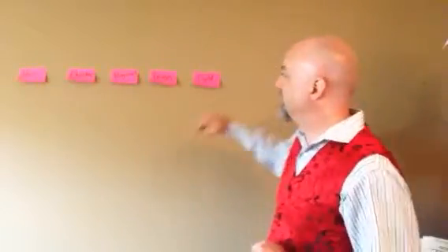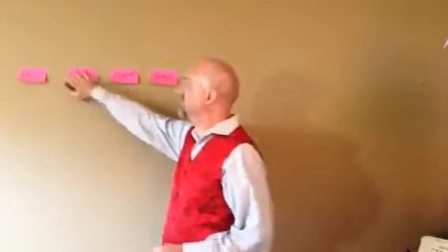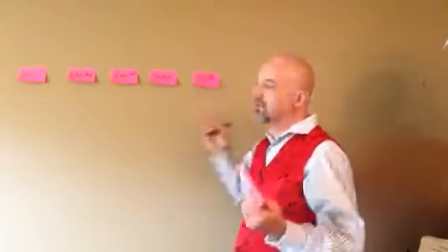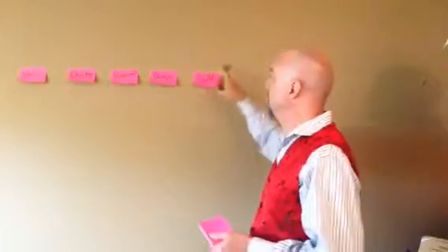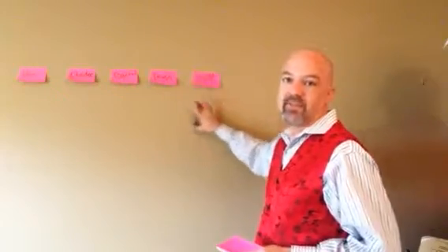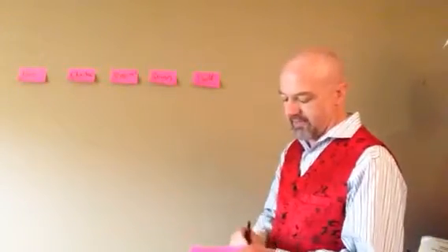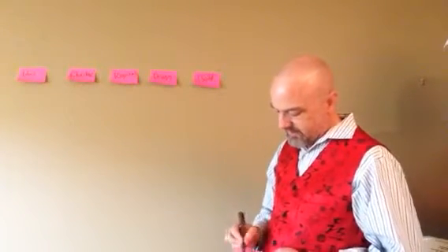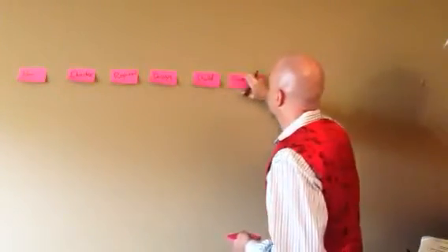So here I've got a few of the work steps. You have ideas, then you charter the work, you do requirements, you design, you do build. In this organization, from my understanding, and it happens a lot in organizations I'm dealing with, the build phase was the agile piece of it. So they do all the rest of this waterfall, and then they have this agile build, and then there's a test phase. Yes, it's pseudo-agile. So there's a test phase out here.